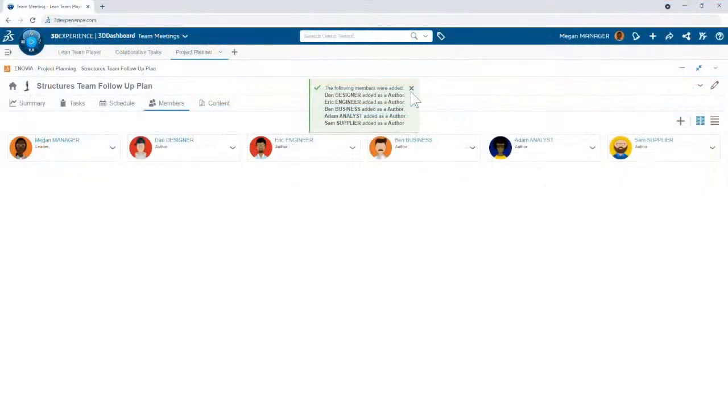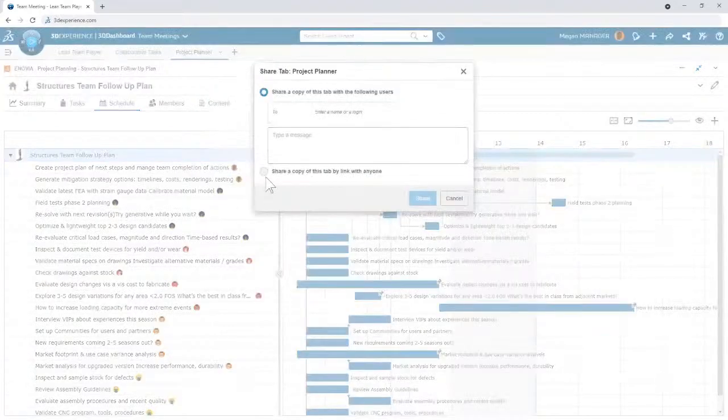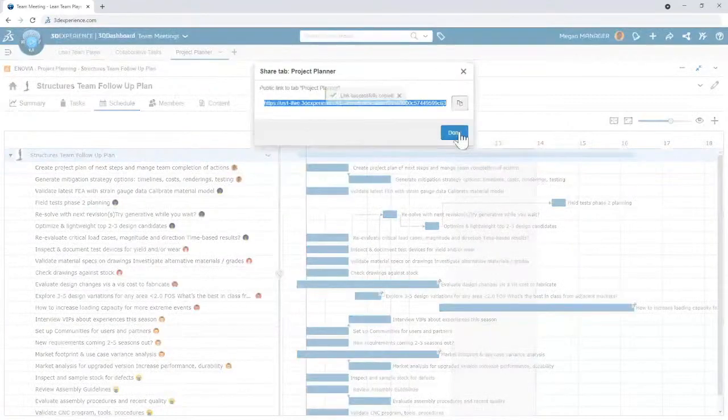They can move schedules around depending on the rights that I give them. But here I want to empower everyone. Everyone's an author. Was I way off that was going to take a half day? It needs 2 days. Great, come in here and update the plan. Next time I come in there, I'll be able to see that update and adjust my expectations. So, really cool. Again, now what's my follow up to the team?